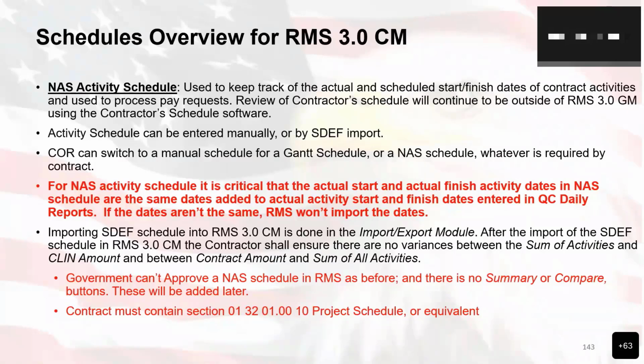The activity schedule can be entered manually or by SDEF import. So if you want to import your custom schedule that you have in another third-party tool, you can import that within the SDEF. The COR can switch to a manual schedule, Gantt schedule or NAS schedule, whichever is required by the contract or whichever your district deems fit for that particular contract.